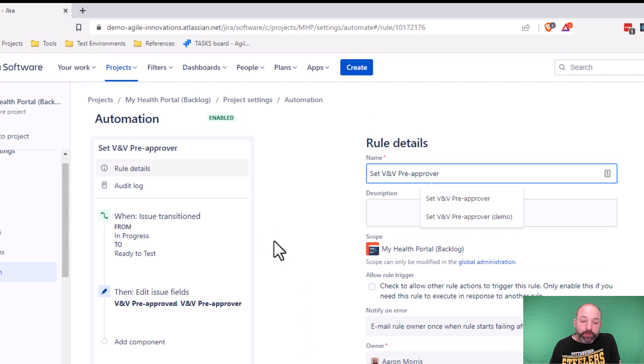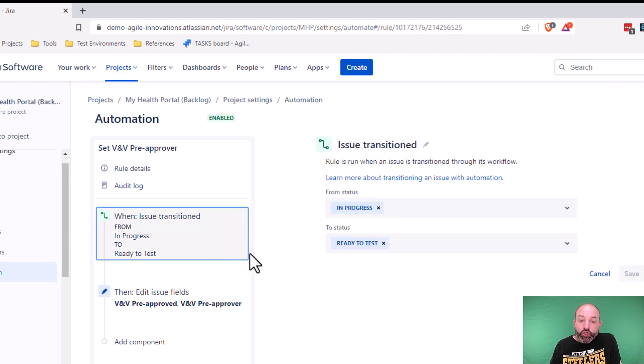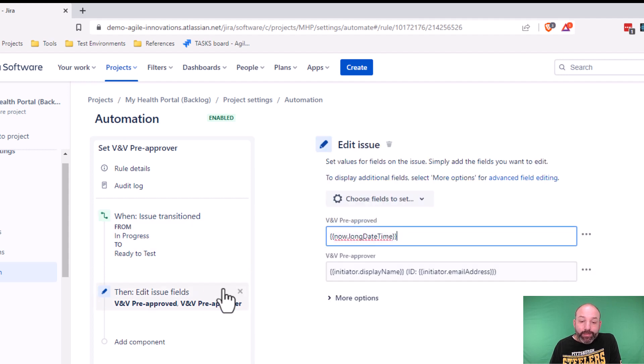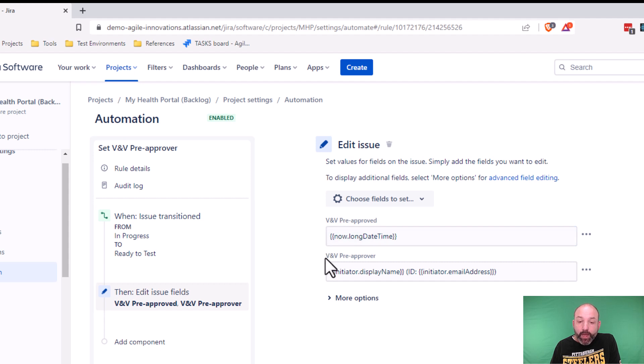Let's look at the rule for setting the pre-approval first. This rule has two pieces, a trigger and an action. The trigger is the status transition from in progress to ready to test. The action is to edit our two pre-approval fields, VNV pre-approved, which contains the timestamp, and VNV pre-approver, which contains the name and ID.